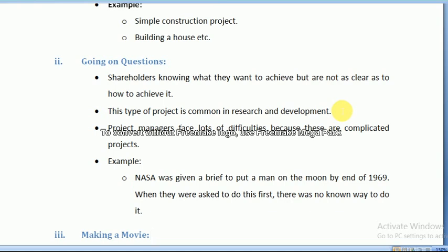So in this case, all of the documentation that we already discussed in the project management process, like the scope of the project, the work breakdown structure, the contract, the project plan, all the straightforward list of each item your team is expected to deliver. For example, let's suppose we are going to make a website. So what kind of list will be included? Like content strategy, what will be our content and what will be the sequence of our content, wireframes, then the different designs that will be used for the website, then how we will develop it, then we will input the contents, then we will test it.